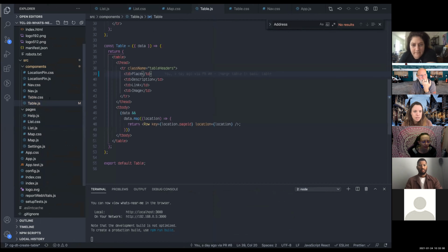Functional versus non-functional requirements. So there's the feature itself, and then there's maybe performance. I think the original article had accessibility here, and I took that out because to me that shouldn't be something that you split out that way necessarily. So functional versus non-functional requirements is sort of where you start. If it performs well enough, but you should at some point improve it, then you might move that performance goal out to another story later and start getting value from the feature.